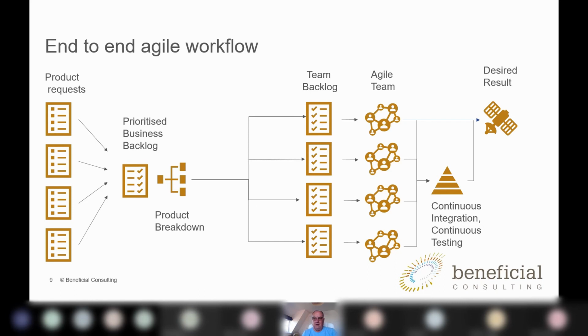That point could be a master team that actually integrates everything for everybody else, or it could be a separate integration function. If you look at the Nexus framework, you have the integration team, which is like a little bubble on the side. You could do that. You could have the teams automate continuous integration, and indeed that will probably be where you want to get to. But at the beginning, at least, you're nearly always finding that teams, or organizations, aren't very well equipped with sophisticated automated testing.